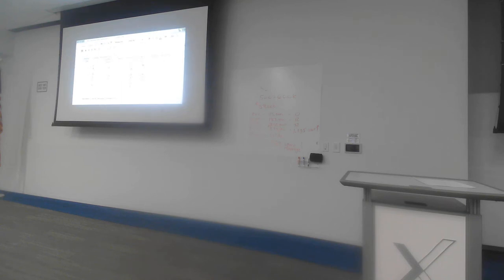Also, I have to keep track of the numbers in terms of the costs versus the bonuses that I have available to me. So I want to have two different tables besides the tables that I have here, in terms of keeping track of, first of all, the costs. So this is the table that I'm going to use to keep track of that. And also this table here to keep track of my project paths, to see if my critical path is changing or if I'm getting double critical paths at any stage.